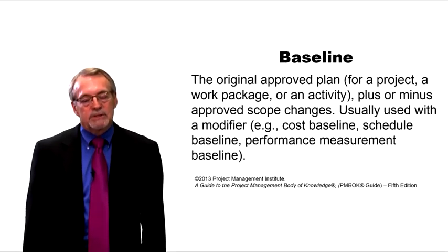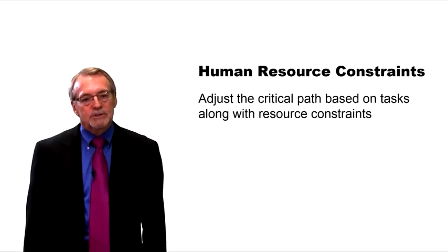We have a baseline, and we've seen some examples of both of those. That's what we just were looking at. Baseline. Once we get our schedule laid out, we have a baseline for the project. You don't change the baseline. The only way you change the baseline is if you go back and redefine the project. Baseline stays the same, and now we use that to judge how we're doing with the rest of the project as it moves forward.